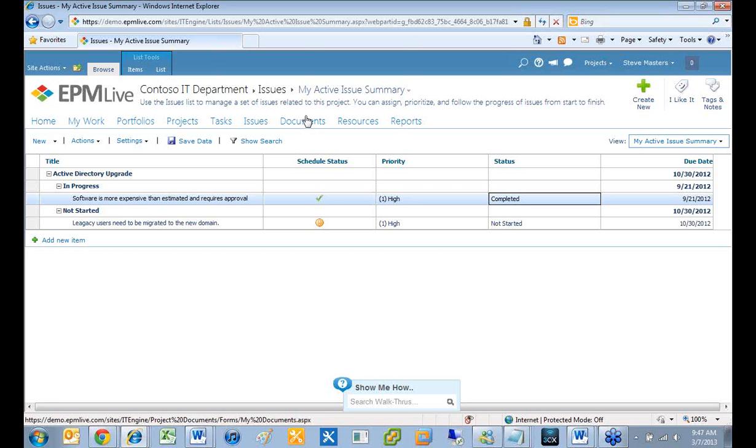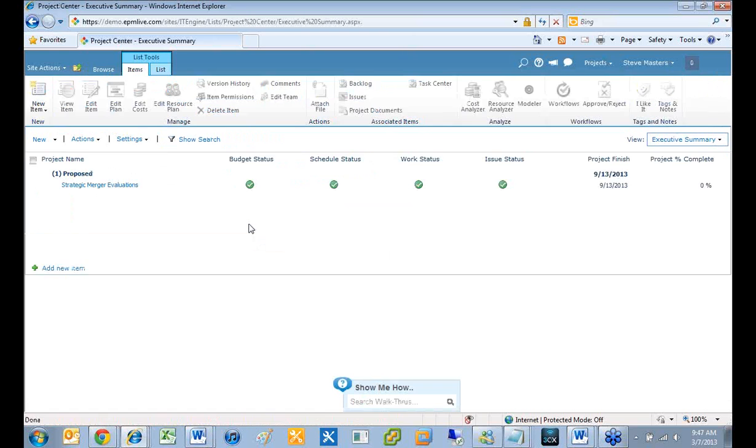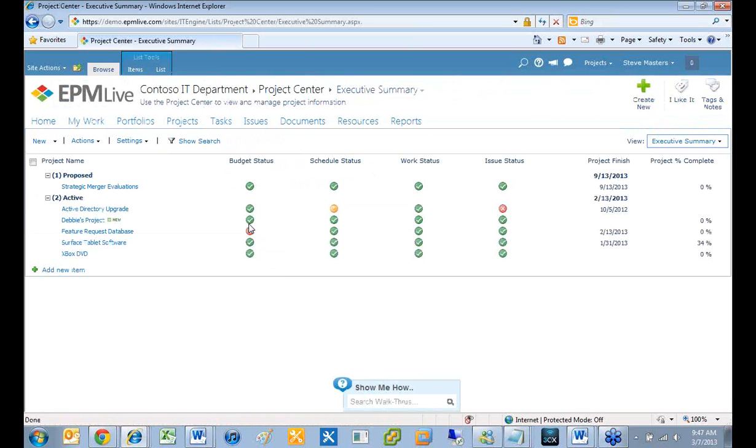So there's definitely things that you can use, as well as Microsoft Project. So if you're already using Microsoft Project to manage your schedules, that's definitely a good start. The problem with that is you have a resource pool in your Microsoft Project schedule, and you have no visibility into everybody else's Microsoft Project schedules. So you don't know if these people are actually available or not, and then you have to go try to talk to them and track them down and talk to the other project managers and try to bring all this information together, and that can be very hard to do.